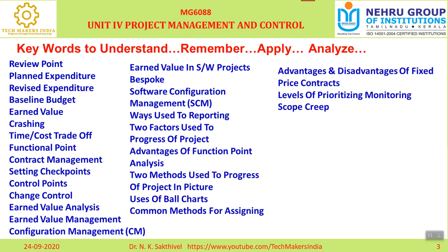Please understand. Continuous growth in the project scope means that the project was not studied properly and not designed properly, so during every iteration discussion we are updating new scope. Understand? So this is the problem. Before starting any project, the scope of the project should be discussed thoroughly and finalized. After that, the growth of the project scope should not happen. So the proper definition is required. In other words, scope creep is nothing but the project is not properly defined. This is the meaning I wanted you to understand.